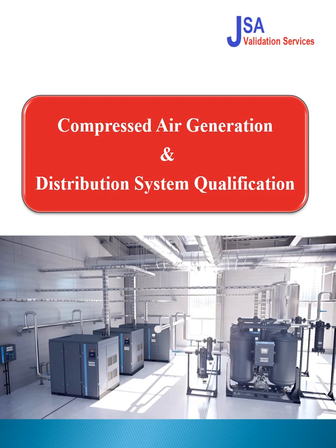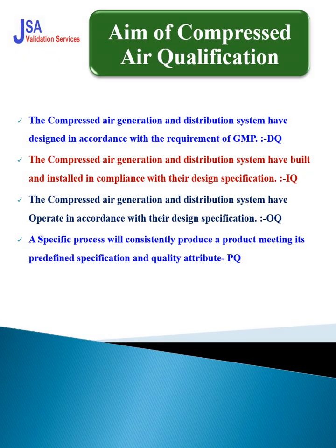Okay, so our aim to qualify the compressed air is that the compressed air generation system and distribution system should be designed in accordance with the GMP. That is called the design qualification also. So this is verified in design qualification, and the compressed air generation system and distribution have been built and installed in compliance with the design specification. That is our aim to qualify that, and that is called the IQ.